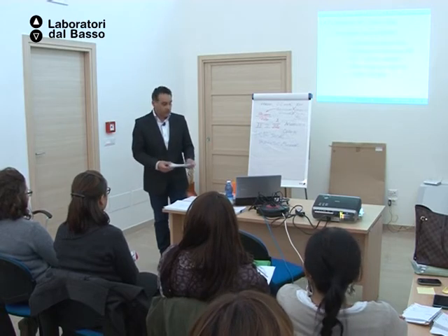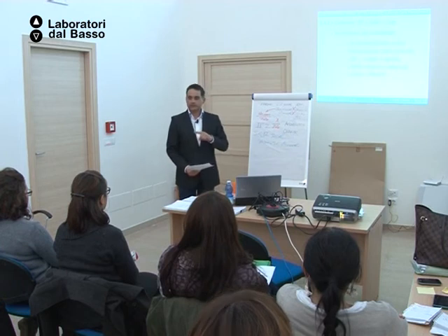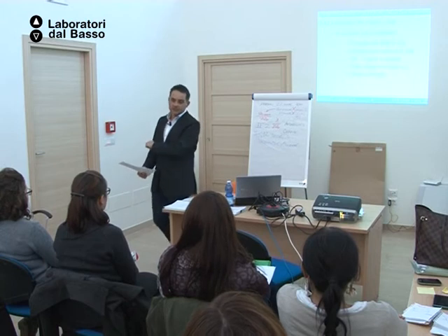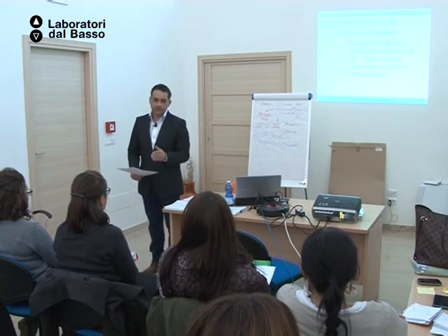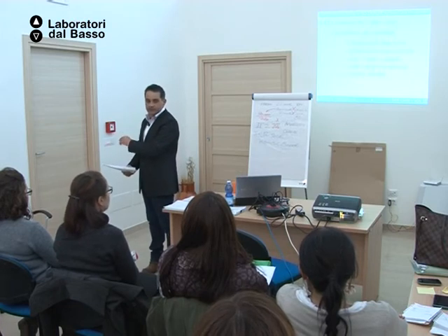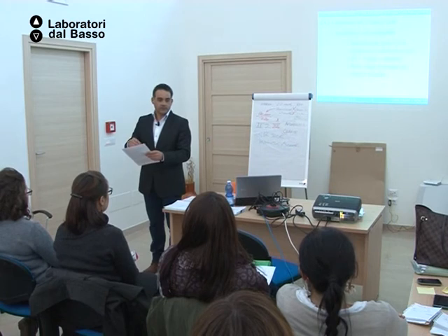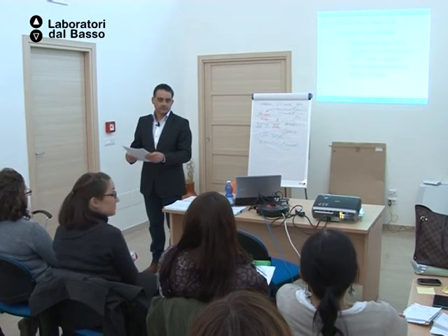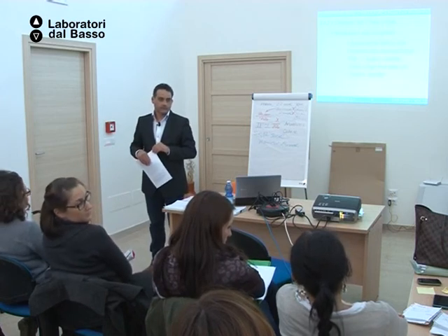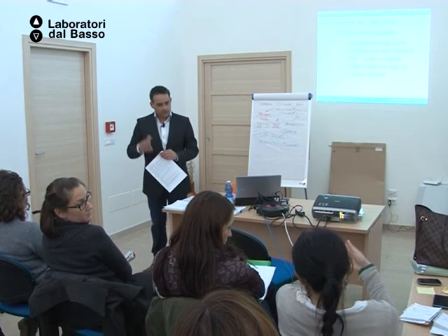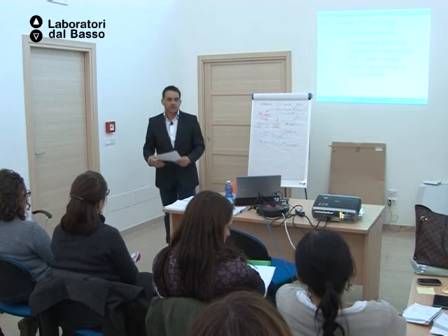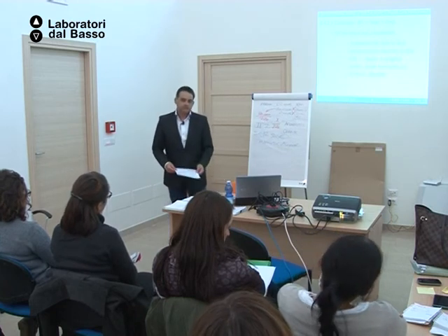The reason why I'm suggesting one partner leader for the work package is because it's easier to fill in the tabs after that. You know, one partner, one work package, one row for the staff. It's not different partners for the same work package. Yes, you have to allocate budgets on management, for example. You don't have the choice. Dissemination, you don't have the choice. Okay.